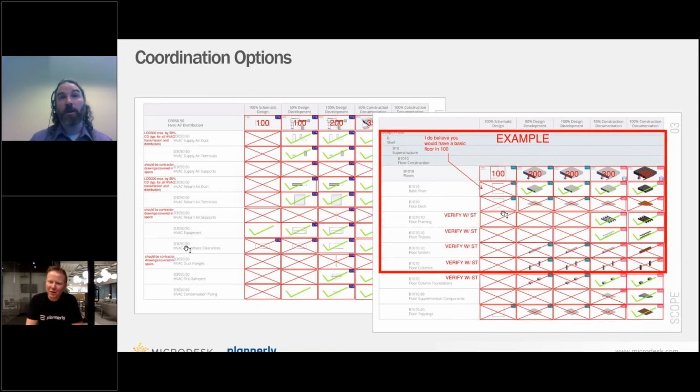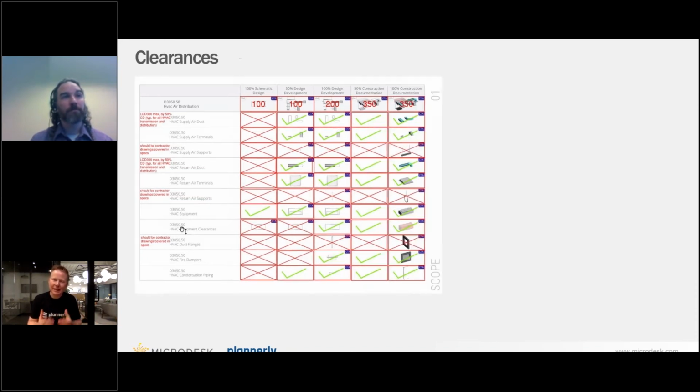That's so you're not opening up Word. And just to reinforce it, when you create something and it's a PDF, in our industry we're very contractually passing the buck all of the time, saying, here, this is your responsibility, and you get a stack of contract documents, and they have to then find where exactly their work is. Most of the time, you get a bid back or a response back which is inflated because there's an element of risk. They're uncertain about what they're supposed to be doing, when they're supposed to be doing it, how much they're supposed to do.